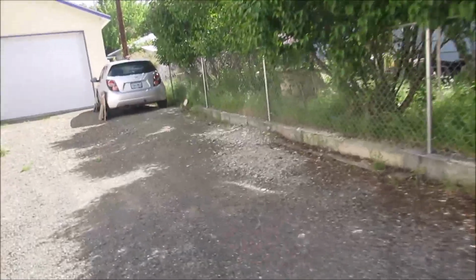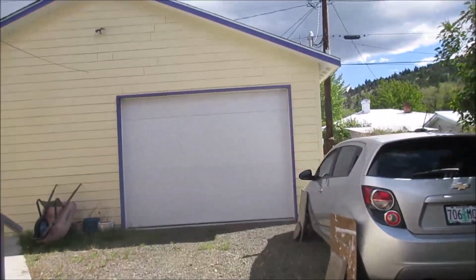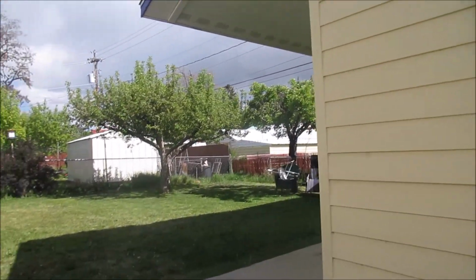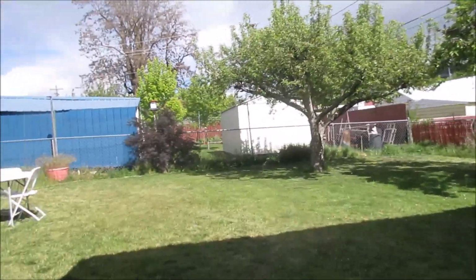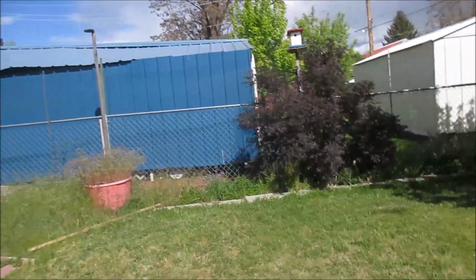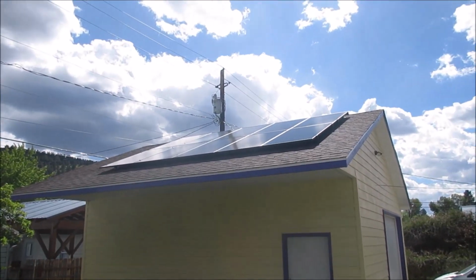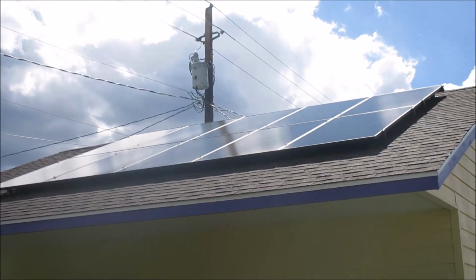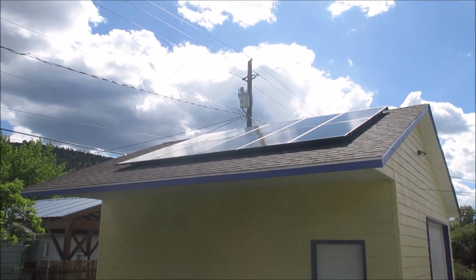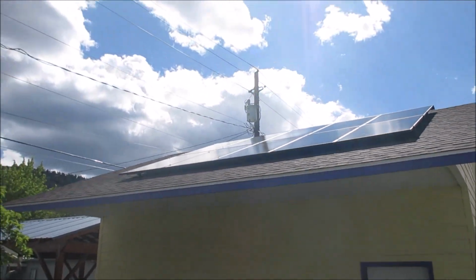The panels are on the roof. They could be generating electricity right now if I were to throw the circuit breaker. But we have to wait for an electrical inspection and then final hookups for the utility. So the local utility has to inspect a few things. This is the way the panels look on the roof. This is the east face. We already managed to test out the panels. We were generating almost 4K watts, even though we have mixed sky right now with clouds.